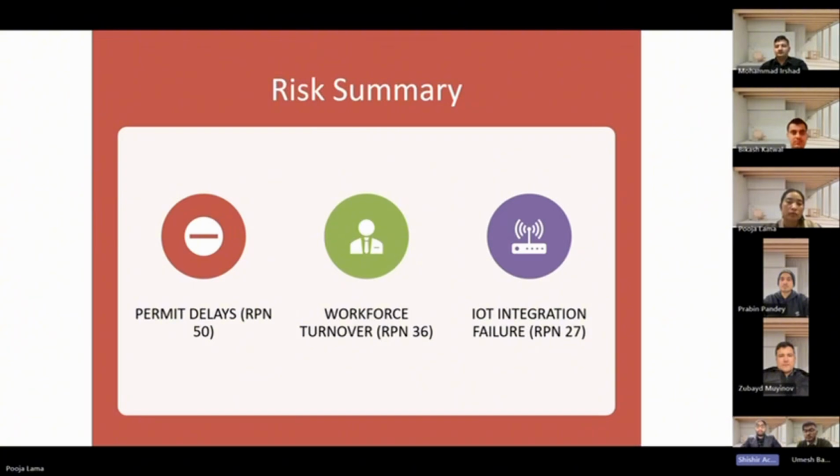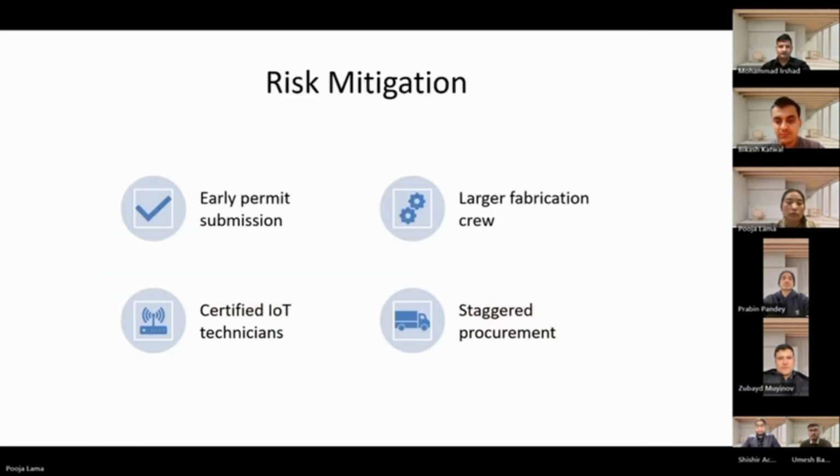My name is Sisir Acharya, and I'd like to walk you through the key risks we are actively managing on your project and how we are keeping delivery stable and predictable. The highest impact risk occurs during offsite fabrication. This phase drives the entire critical path, so any turnover or slowdown can affect everything that follows. To protect your schedule, we have built a stable fabrication crew and added cross training and secured subcontractors so that production continues without interruptions. Next slide, please.